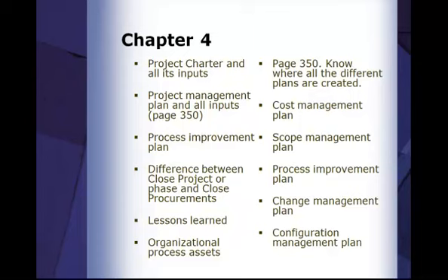You need to know that you're formally closing all the documentation on the project. For that reason, the word administrative closure might be a bit foreign, but it was in a previous PMBOK guide. But you do need to know about administrative closure. Closing out your documentation. Lessons learned and so on. We all need to do lessons learned on our projects, make sure that they're there at the end, close out the project in a sensible way with these lessons learned. Otherwise you'll keep making the same mistakes going forward. Okay? Organizational process assets updates, mind you, because we update our organizational process assets at the end of the project. We need to know that.